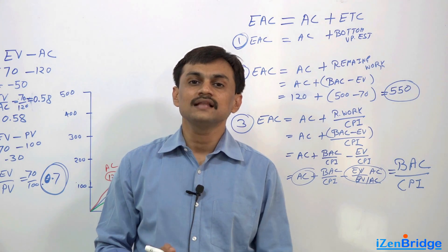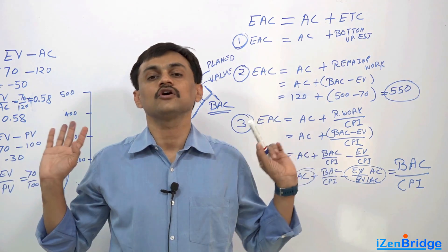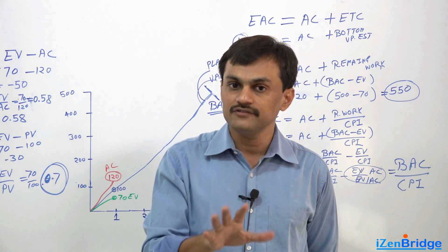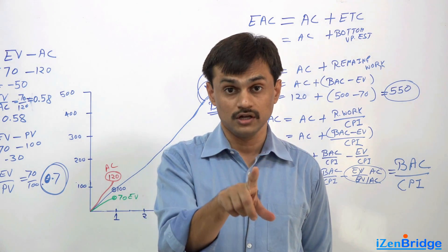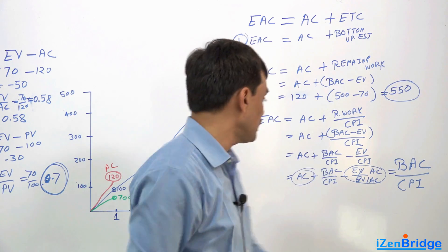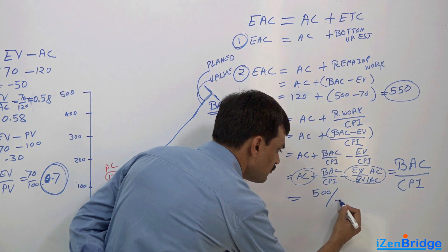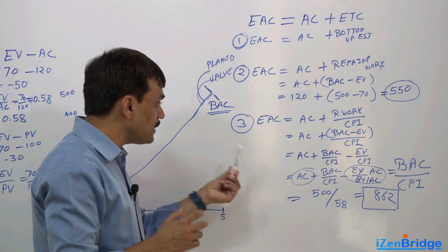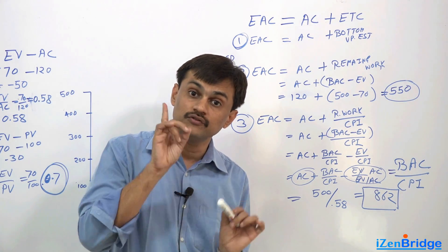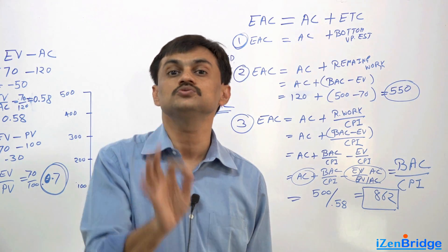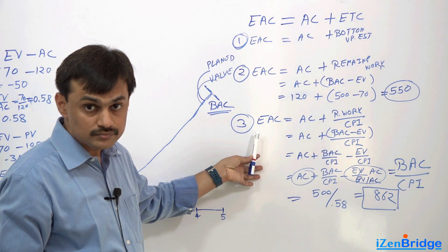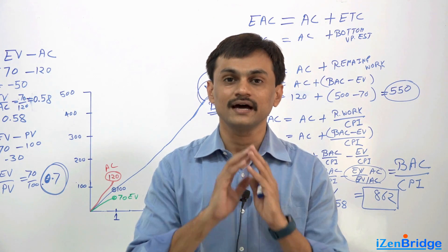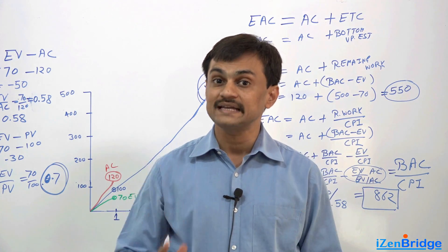Simply put: whatever budget we had, we need to factor in the cost performance index. We need to assume we are going to get only 58 cents from each dollar. So if we planned spending 500 dollars but are only getting 58 cents worth from each dollar, we need to recalculate. That is 500 divided by 0.58, which gives us 862 dollars. So if the CPI trend continues at 0.58, the estimated completion is 862 dollars. Apply this formula when your question indicates these variances are going to stay — they are not dying out and you need to factor this reality in.